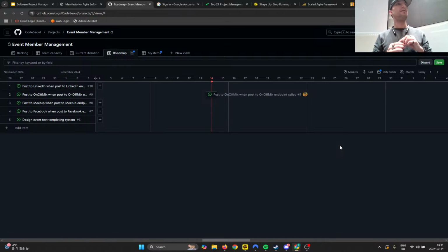We would have our sprints, but we would make it such that you would code for 1 week, and then you'd have, I don't remember how many days, but like 3 days at the end of the sprint for bug fixing. Because we were in this constant process of trying to constantly move through stages while developing.